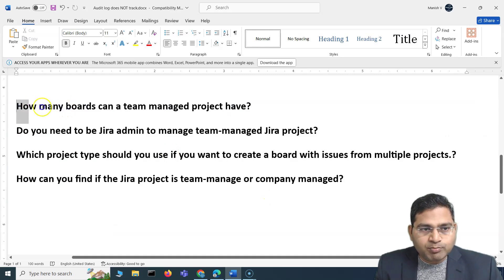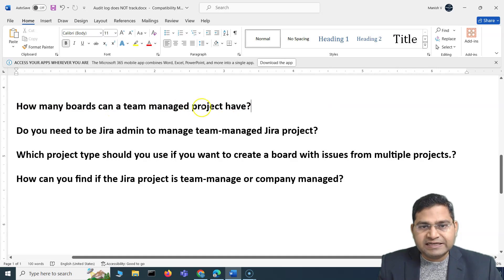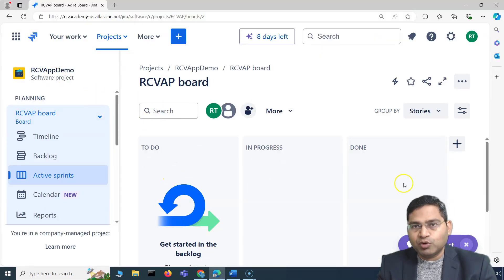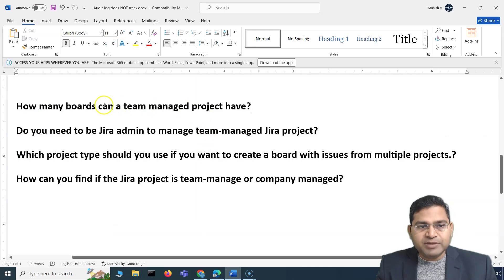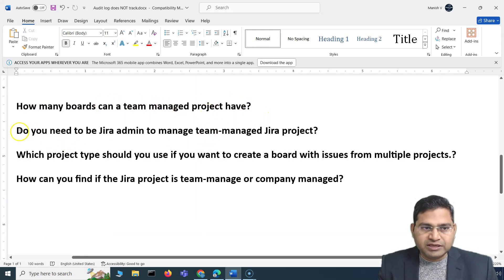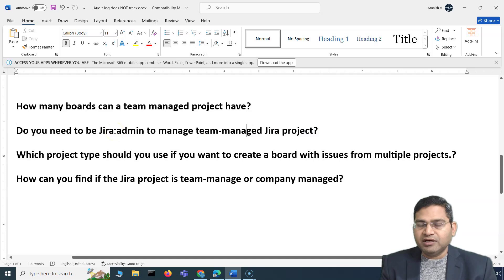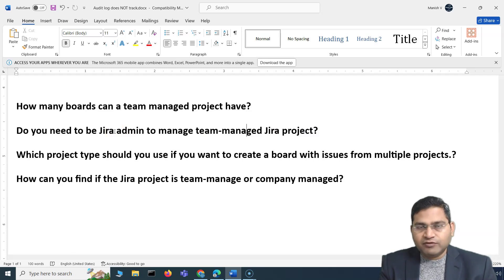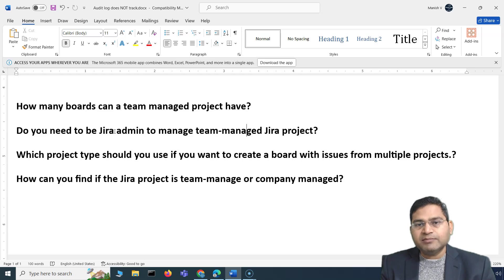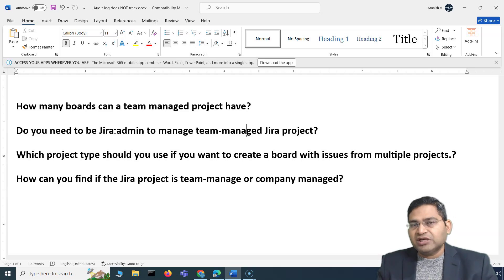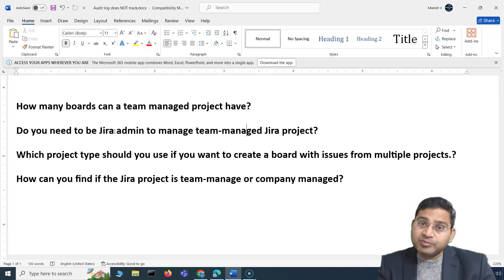First important question: how many boards can a Team Managed project have? A Team Managed project can only have one board — you cannot have multiple boards. But for a Company Managed project, you can have multiple boards. Next question: do you need to be a Jira admin to manage a Team Managed project? No — whoever created the Team Managed project is by default the administrator. It is self-contained, so anyone within the team can manage it without impacting other projects.